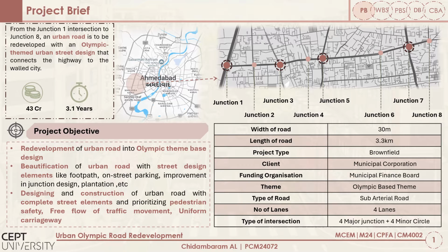The project aims to connect the highway to the walled city, ensuring pedestrian safety and seamless driving experience. With an estimated project budget of 43 crores and timeline of 3.1 years. The client is Municipal Corporation and funding organization is Municipal Finance Board.